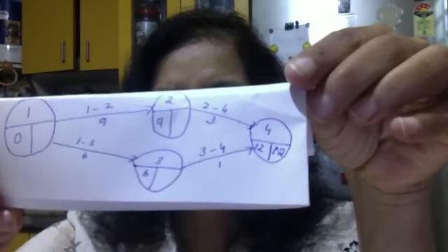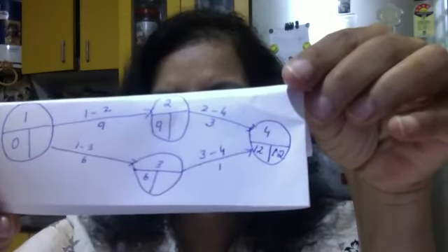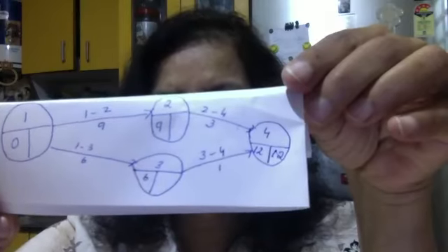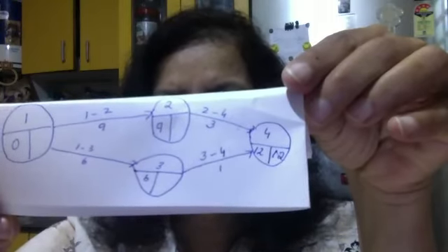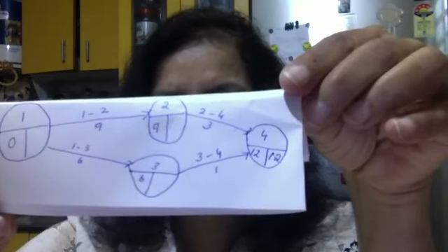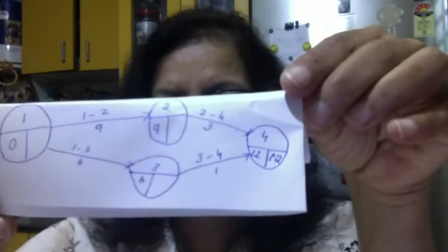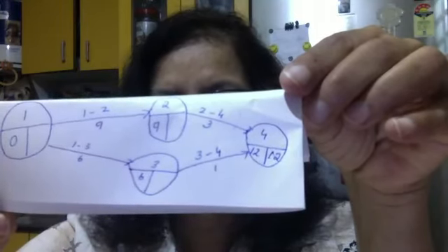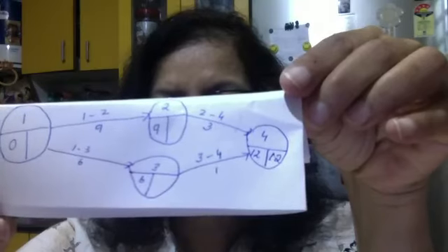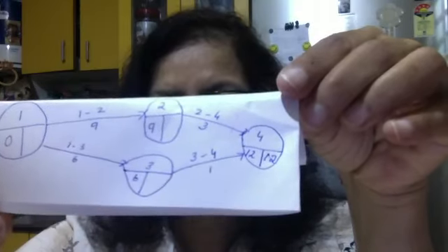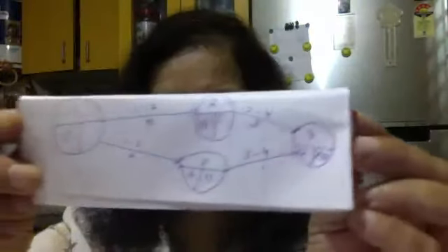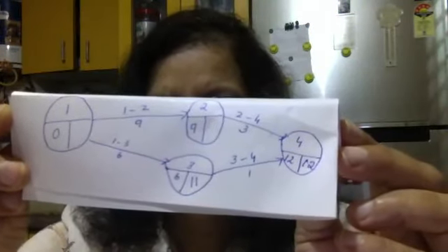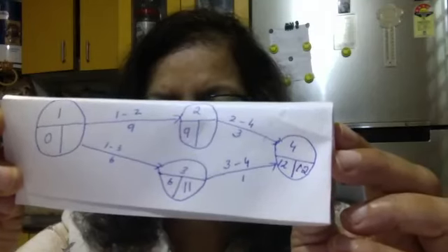Now we will work backwards. I want to work out 4 to 3. Alright, 4 to 3 has a single joint, single branch. You have no problem of decision. So 12 minus 1 is 11, which I'll write in that empty column in 3. 12 minus 1 is 11. Did you understand? 12 minus 1 is 11.